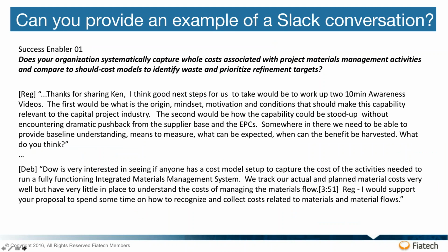So I'll just kind of paraphrase this. This is an example of a success enabler that was identified. We were talking about how do you go about establishing baselines associated with handling and movement of materials on an enterprise basis within a project. And the question was, before you start thinking about productivity improvement and productivity-enabling technologies and all these things, you really need to be able to baseline where costs are manifesting and how costs are manifesting, and what it is about the behaviors and things like that that are causing that to occur.